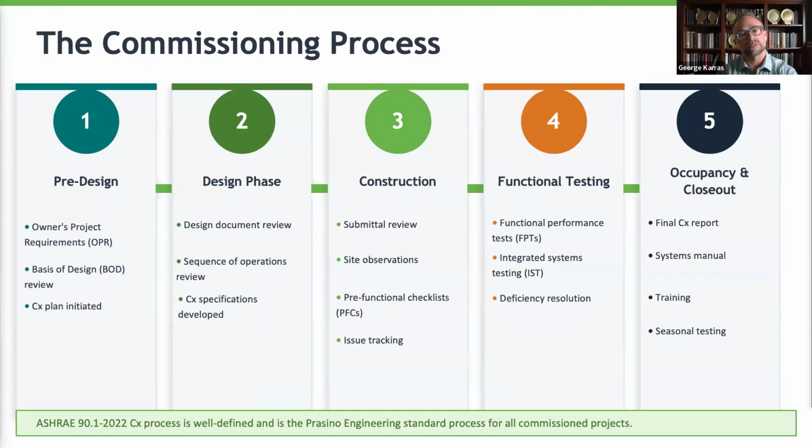So the commissioning process, what is the process? Now, there's a pre-design phase where your OPRs and your basis of design documents are created, and that's usually where your CX plan is also initiated. That's how the process looks.